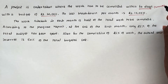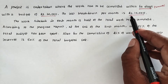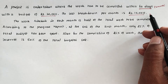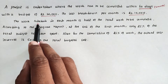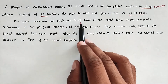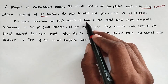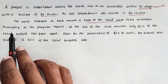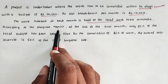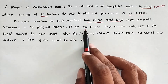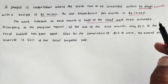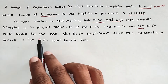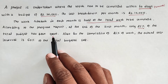For the first month we have to spend 10,000, and for the second month we have to spend another 10,000. The work scheduled each month is half of the total work. According to the program progress report, at the end of the first month only 25% of the total budget has been spent.